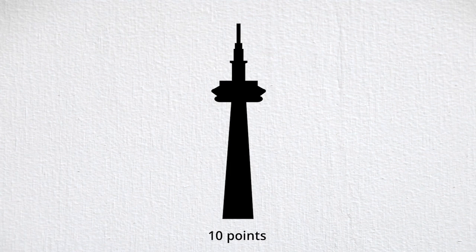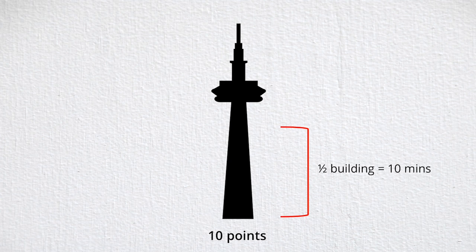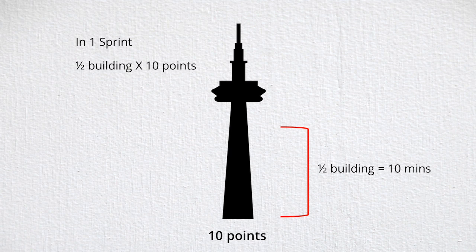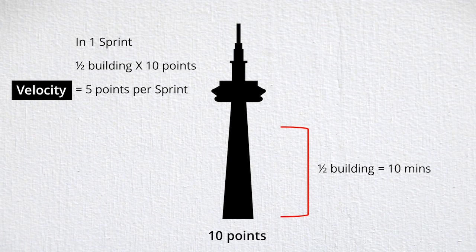So to the first building stairwell we go. And after 10 minutes, we find ourselves halfway up building one, the 10-point building. Now with this information, we can work out what our velocity is – or in other words, the amount of work in points that we are able to achieve within our 10-minute sprint. Based on the fact that we climbed halfway up the 10-point building, we can say that our velocity is five points per sprint, or more simply put, five points.